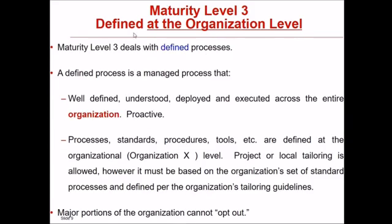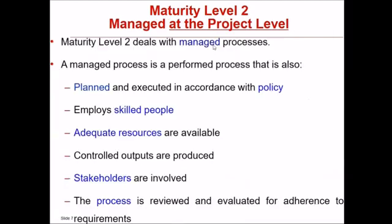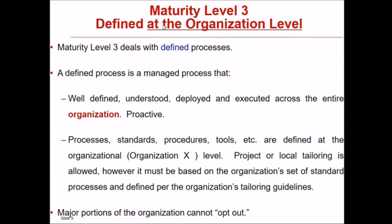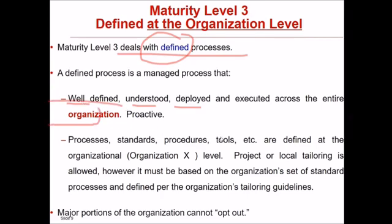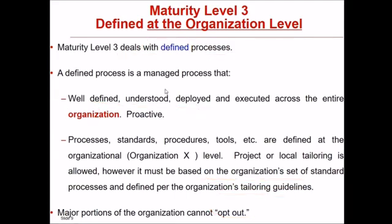Maturity level three is Defined, at the organizational level. While level two is managed at the project level, level three is at the organizational level. A defined process is a managed process that is well defined, understood, deployed, and executed across the entire organization — processes, standards, procedures, and tools are defined at the organizational level. Project or local tailoring is allowed, but it must be based on the organizational set of standard processes and tailoring guidelines. Major portions of the organization cannot opt out.